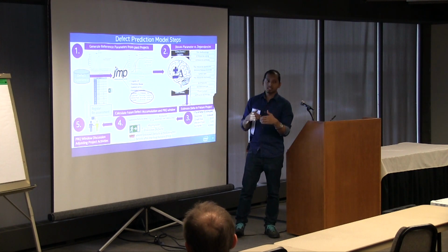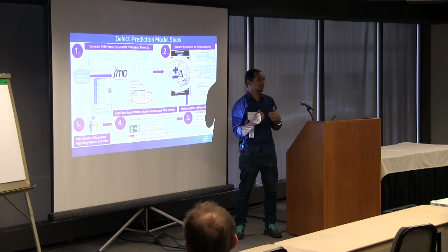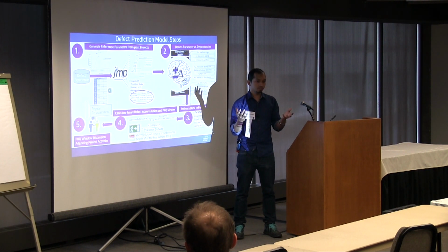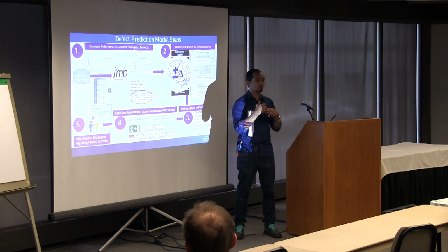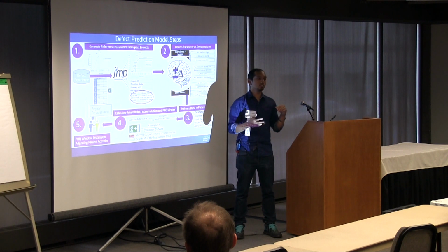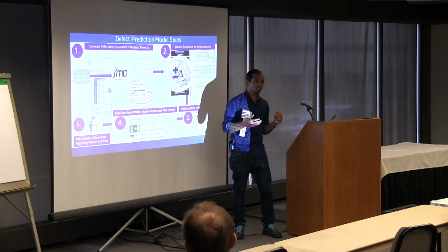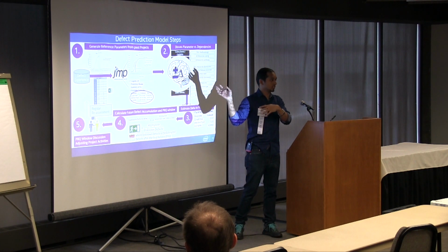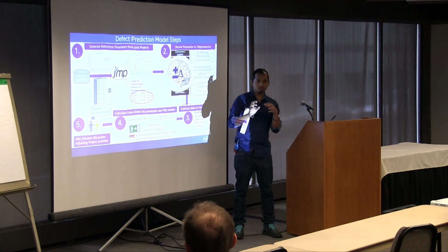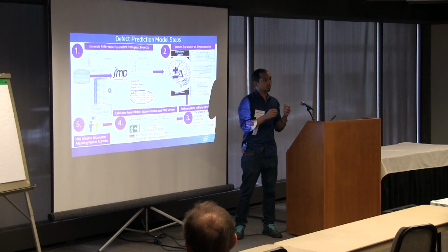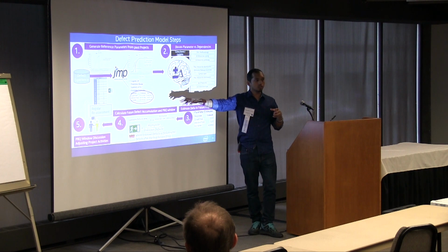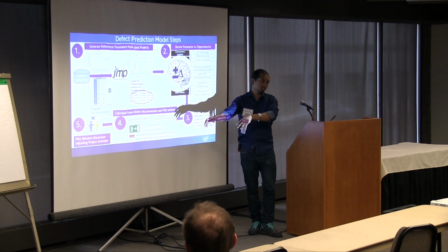Step 2 is discussing those parameters with certain dependencies. What I mean by this is that every project has a certain number of components. So you have to discuss the architectural complexity, the number of features, and how many validation engineers there were. I have slides on all these parameters as well, so I'm just giving you an overview. Based on this, you discuss the parameters you got over here against those dependencies.